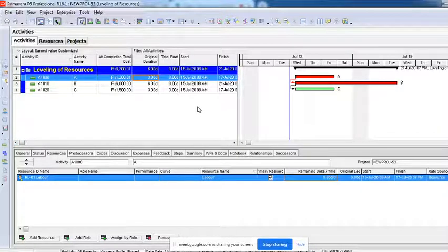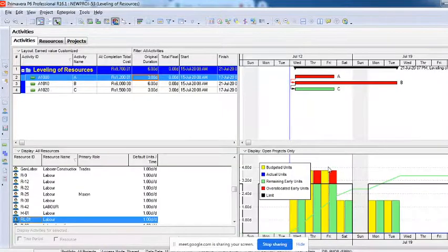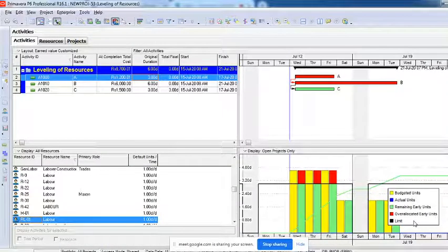Right, so now it is start to start relationships. Again, you can see there is an over allocation on all the 3 days, right? Maximum what we have is this much, and over allocation is this much on each and every day, because we have only 3 on Wednesday, 3 on Thursday, and 3 on Friday, but what we have allocated is 4, 4, 4, right? Here 1, here 2, and here 1.